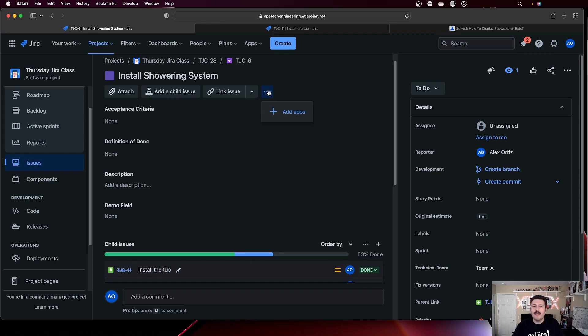Even if I click this little ellipsis, this is for an app. This is to link an issue, which is not what we want. And this is to add a child issue. Now you may be thinking that's the subtask, but no. The child issue, if you're looking at the hierarchy in Jira, it goes Epic, then your story, then your subtask. So when you click on that add child issue, you're not going to add a subtask — you're going to add a story, which is technically considered the subtask of an Epic. But that's not the same thing. Your hierarchy here is very strict: Epic, story, subtask. And an Epic cannot go directly to the subtask — it just can't bypass the story. It's not designed that way.